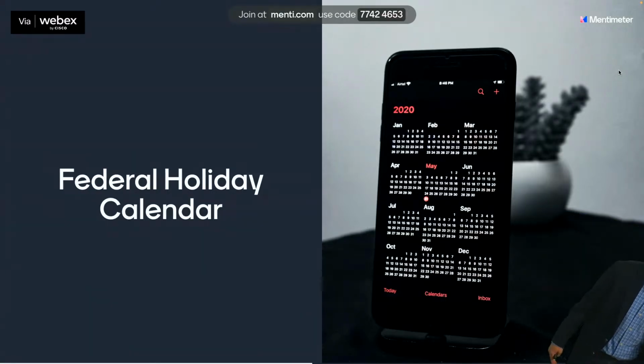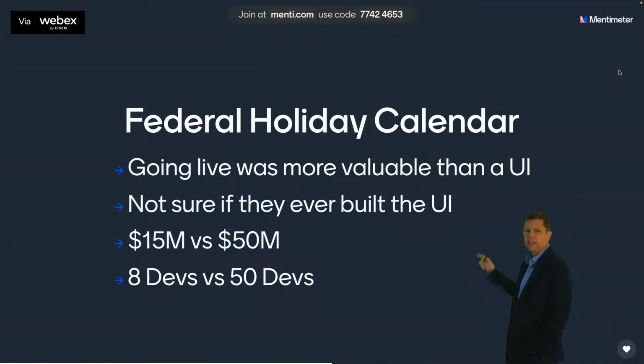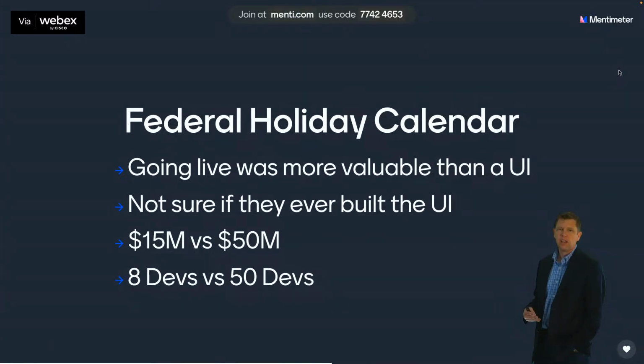They said, no, it's not actually MVP. And the customers decided that going live was more valuable than having a user interface to do this. I'm not even sure if they ever built the user interface, because what they decided was, we can just do this in Excel and upload it straight into the database. It's low risk. It's just the calendars. This is easy to do in Excel.